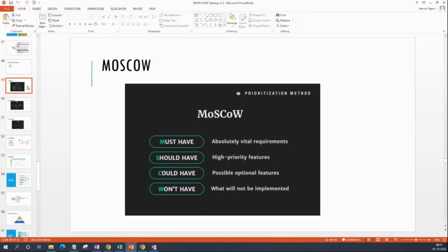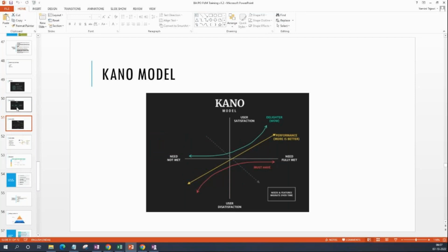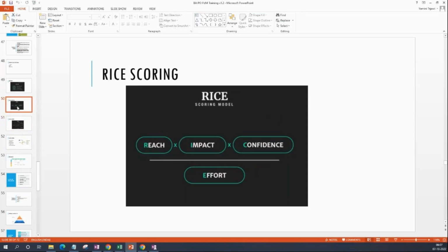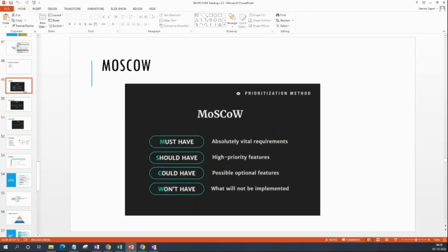And you as a product owner will be working more on the stories. So this is a technique you may have to stick to. If you see here, this is all at the feature level. RICE and KANO are more at the feature level. And this prioritization sometimes would be done by the product manager itself. So you need not worry much here. But of course you need to know the various techniques that are there. In reality, MoSCoW is the simple and most widely used technique.